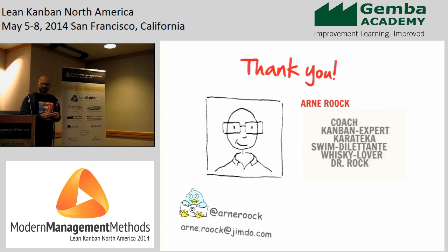What if two weeks is too long? What if there are emerging requests that come in during those two weeks and something is high priority? How's that addressed? They have a kind of fast lane, but they use it very rarely these days. What they do have is second level tech support. It's also done by this team, and they reserve about 20% of their capacity for this kind of work. So when they plan how many items they can pull in, they know they cannot utilize the system 100% because they have to do second level support.